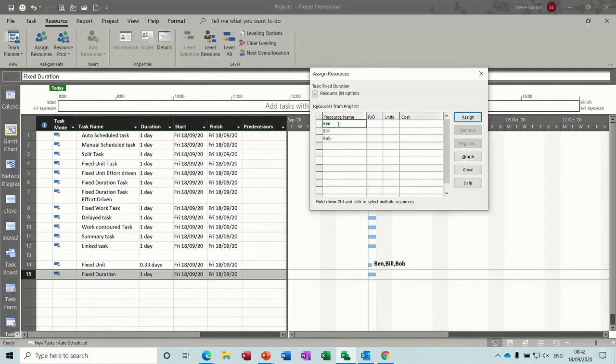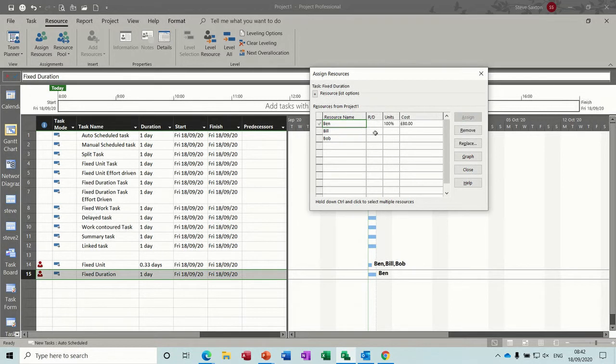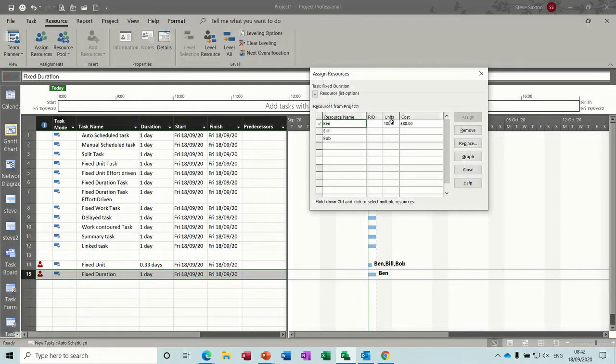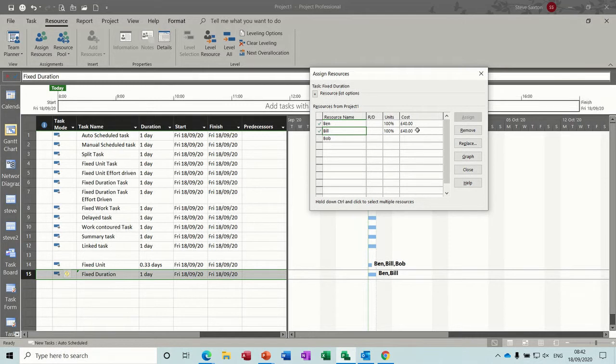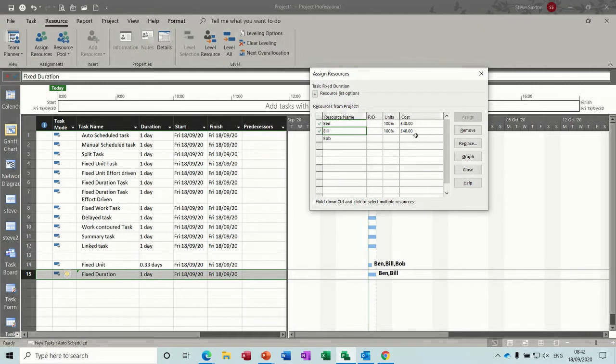I'll assign Ben, nothing happens initially, because that's my first assignment, the duration stays at one day, however the cost is at £80 still. If I assign Bill, watch what happens. So the duration stayed the same, because it's fixed, but the effort has halved, so now they're only doing four hours a day, £40 each. So that's what's reducing the actual man hours on the task.